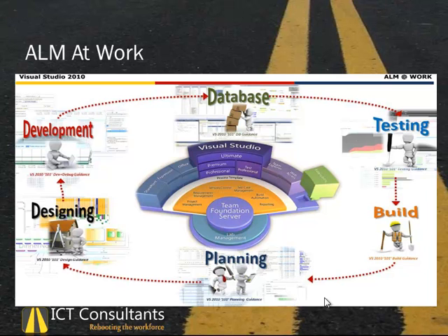Daily Scrum or stand-ups. Stand-ups are daily meetings, just short meetings, max 15 minutes, where we are together, maybe at the beginning of the day or just before lunch, with the whole project team, and there are 3 principal questions. What did you do since the last stand-up meeting? What will you do today? Are there some dependencies in your work? Or maybe are there some dependencies with someone else on the team? Are you waiting for someone? Are you blocked right now, or can you just go on? Those are the 3 questions you ask in every stand-up meeting.